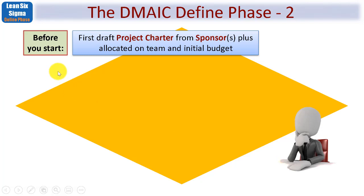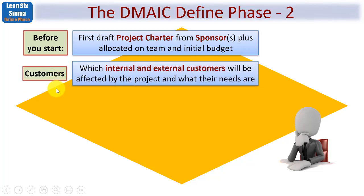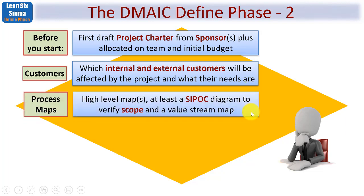Before you start, review the first draft project charter normally created by the sponsor, and confirm that a team has been allocated along with at least some initial budget. We need to understand which internal and external customers will be affected and what their needs are. We'll build high-level process maps, which at a minimum include what's known as a SIPOC diagram, and also verify the scope — what's in and what's out. A value stream map may also be needed.